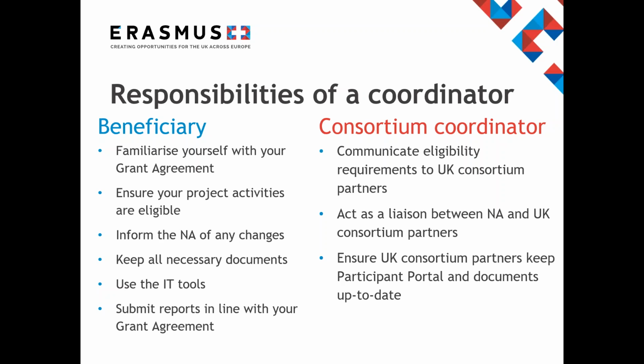Ensure that the templates that are provided are actually used, as we will expect to see them when completing the checks. You need to use the IT tools mandatory to manage the project, such as Mobility Tool Plus and Participant Portal, as these have to be used consistently throughout the delivery of the project. It is also important to submit your reports in line with what is stipulated in your grant agreement. This includes the deadlines and the required information. Failure to do so could result in late payments to your project, or no payments at all if deadlines are missed and the necessary documentation is not provided.